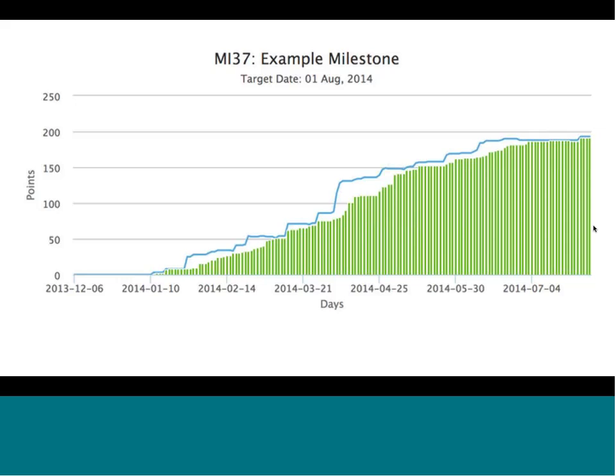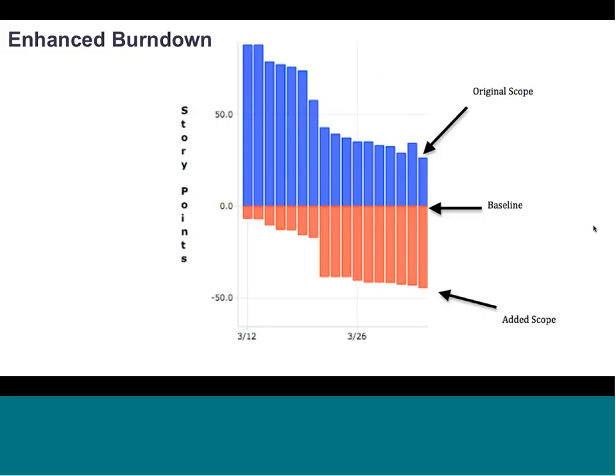So this is one of my favorites because I actually used this prior to coming to rele/CA. The enhanced Burndown really tells a pretty powerful story, and it does so across a release rather than just a single iteration. So in this case, each blue bar shows the plan estimate. So the total of plan work, this includes user stories, defect suites, anything that we're working on within a feature. If the team doesn't estimate using the plan estimate field, then there's going to be a flat line. So you actually have to do some manual work when you're doing your estimates.